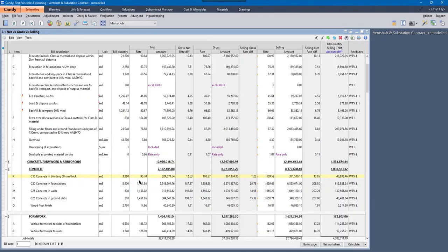Another example of re-engineering would be things like switching between batch and ready-mix concrete, so different construction methods. Another thing would be switching between your own work and subcontracting. That's another thing you'd also re-look at in terms of re-engineering.